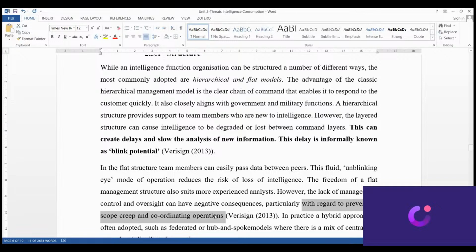Scope creep is an aspect that makes a project delay or drag further, because your terms of reference keep being amended time without number. As a result, the time frame that you expected to finish the project gets overlooked.